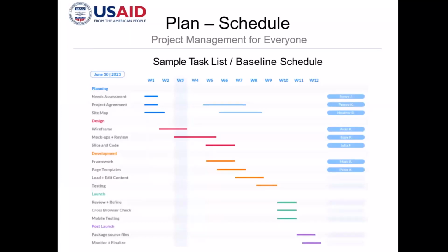So this is how it looks like, right? So if you have a Gantt chart, a simple Gantt chart, you will be able to define how many weeks is a major activity, and then you can place them in parallel with each other so that you will clearly see which major activity or tasks are overlapping with each other, or which task is dependent on which task, right?